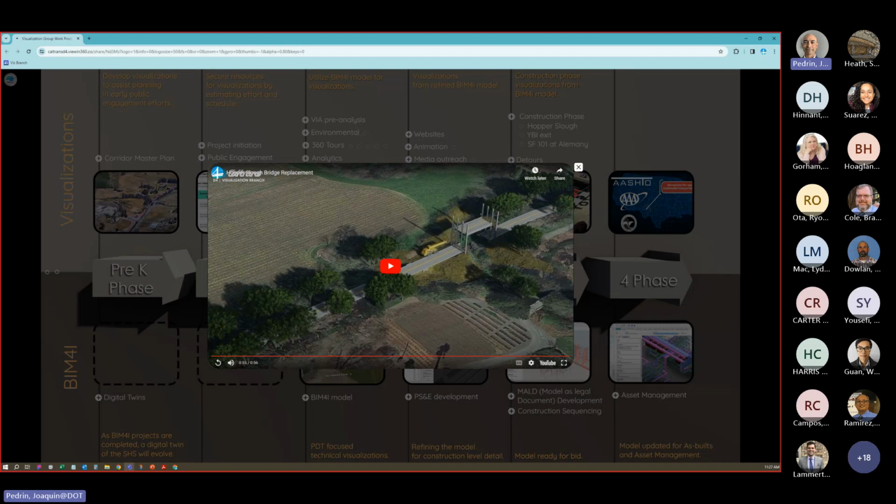and concern. Just to give you a rule of thumb for when to invite us to a PDT as an advisor: projects where there is a concerned community group, a concerned municipality, a concerned permitting agency that we can help with that visual communication, and help PMs tell that message and take some of that burden off of the PM's shoulder, and have this be a tool that can hopefully make partners out of this process as opposed to adversaries. So that is the answer to that question.